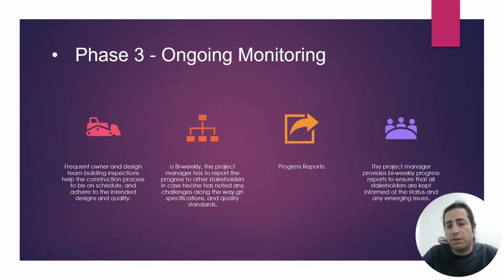Specification and quality standards, and the progress report: the project manager provides the bi-weekly progress report to ensure that all the stakeholders are kept informed of the status and any emerging issues.